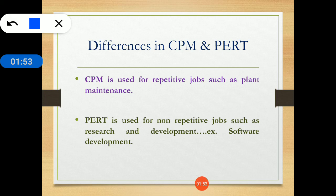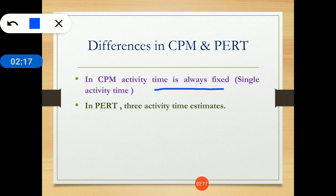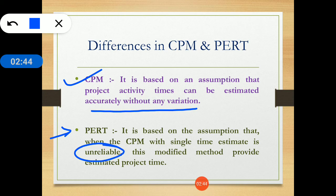CPM is used for repetitive jobs while PERT is used for non-repetitive jobs such as research and development, for example software development. In CPM the activity time is always fixed — a single activity time — while in PERT three activity time estimates are used. CPM assumes activity times can be estimated accurately, while PERT provides an estimated project time when a single time estimate would be unreliable.